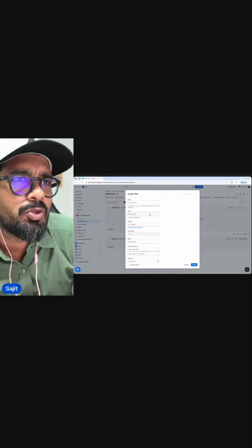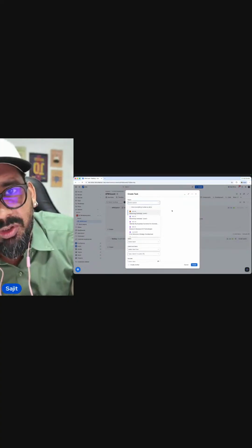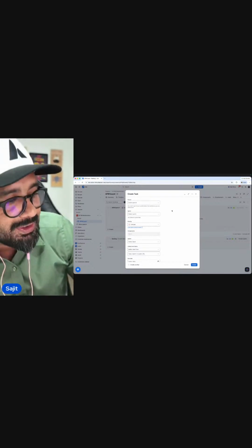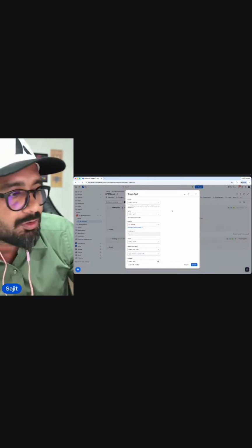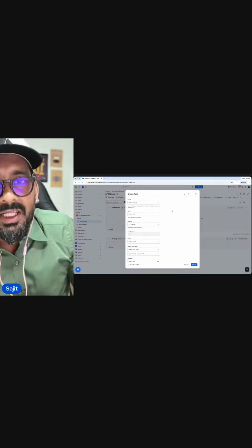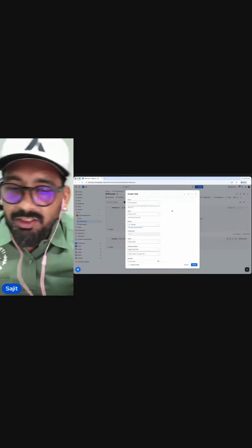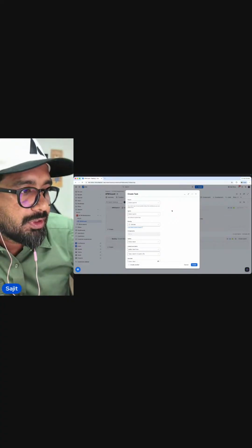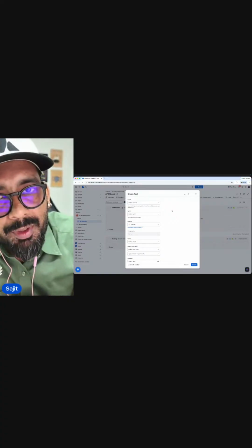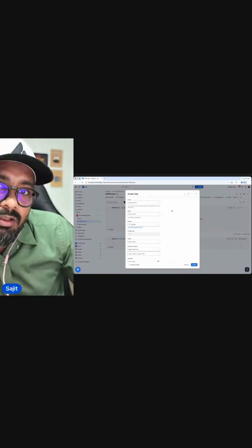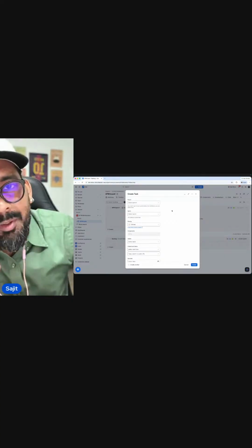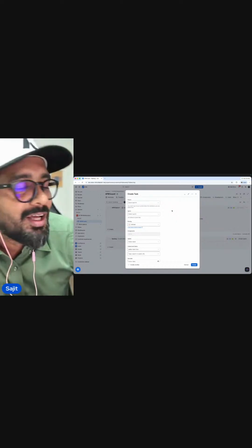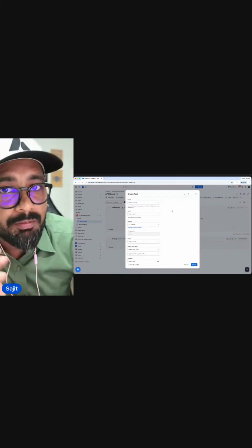All right. You don't have to select sprint. If you have an Epic, you can do that. Epic, as I said, is a larger body of work that will help you see these things in a better manner. So your Epic, let's say you're building a website, right? So your Epic is building a payments gateway. Your story is integrating MasterCard to that payment page. It's a subset of that specific building a payments gateway. And you might have more than one, of course, more than one task or story under that one giant epic.